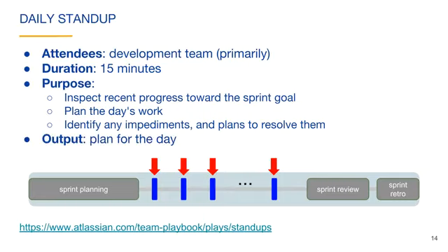It's important that the daily stand-up is a collaborative meeting and not simply a status update. The team collaborates to make the best decisions for the day given the latest information. They usually decide on who will work on specific issues. The plan slightly changes after every daily stand-up. This is continuous improvement. The link at the bottom is a link from the Atlassian team playbook on stand-ups. You can find more information there.